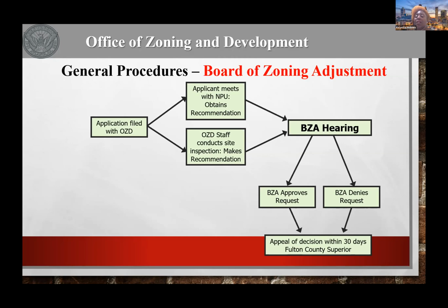And so that is when the plan reviewer or the assigned planner is reviewing the application to determine all the setbacks that are needed, all the relief requirements that are needed. And you'll find that information inside the application as page 2, the referral certificate. Once the referral certificate is completed, then all the administrative information process is completed in our office, and then the same people are notified. MPU chair, MPU zoning contact are notified of the application, and I also receive a copy of the application. It is also assigned to a staff planner,